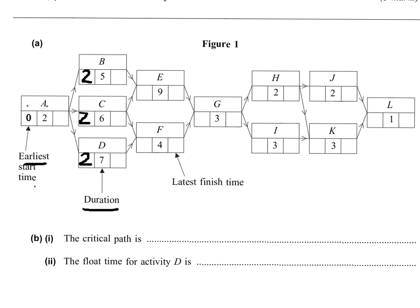So B's task takes 5 days. 2 plus 5, so the earliest is 7. C's task takes 6 days, so 2 plus 6 is 8. So E will have to wait until C is finished, so I would have to write 8.